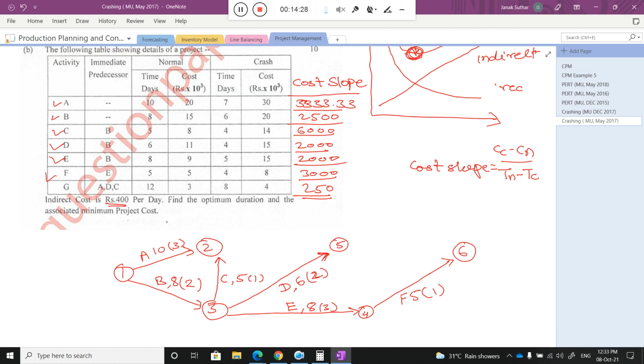Between 2 and 5, it shows like that. If I draw it now, it shows that A and C will end, then you can start the activity G. But it doesn't show the relationship with the D. Here, what is the indication of this particular numerical? A, D, C must complete, then only you can start the G. Are you getting my point?